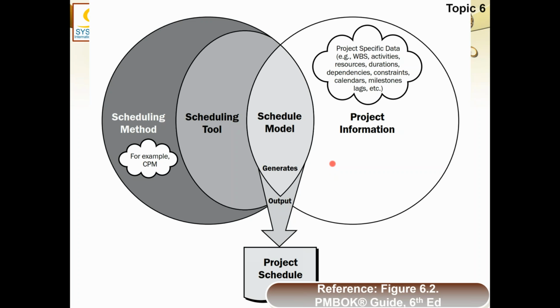When they approve it, then the ball is no more in the court of the project manager. This is now the responsibility and authority of the project board or the project sponsor, who can make any changes to the schedule. At this time, the project manager, his team members, or stakeholders, none has any authority over making changes to the schedule.